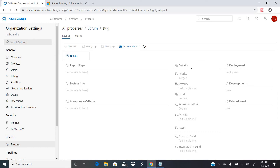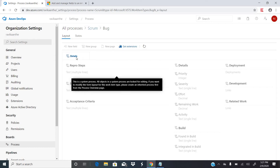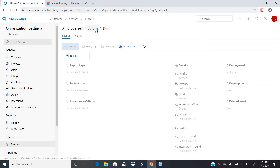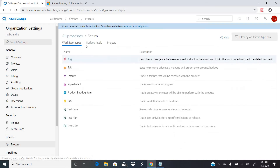Under Bug you have fields like Details, Reproduce Steps, System Info, Acceptance Criteria, Priority, Severity, and Effort — these are the required fields that need to be entered while creating a bug. If you want to add a new field, you cannot, because this is a system-defined process and system-defined processes cannot be customized.